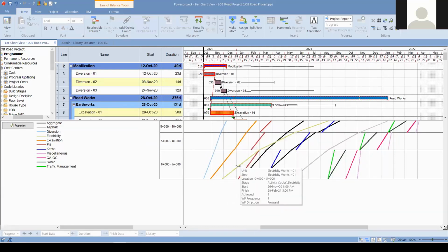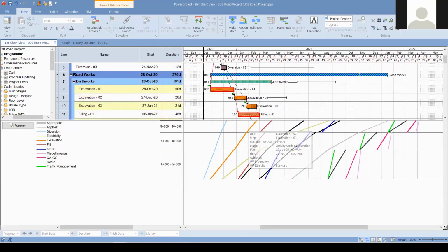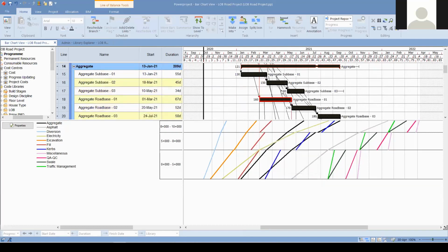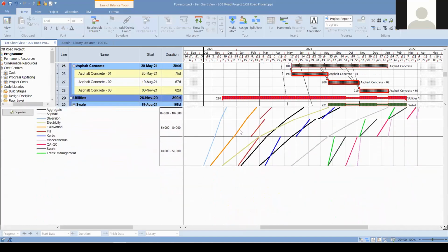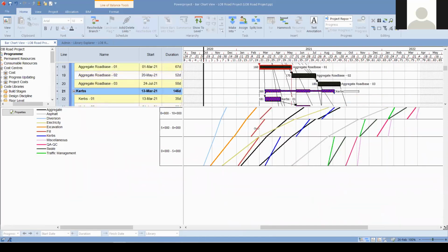And this time we have electrical works, we have filling activities, so they are somehow related with each other. However, these electrical works don't have any predecessor to start any activity. That is why we need to make sure that these electrical activities don't collapse with any other fill activities. So, for instance, before playing with the filling activities, maybe we need to consider finishing these electrical works in a more rapid way.